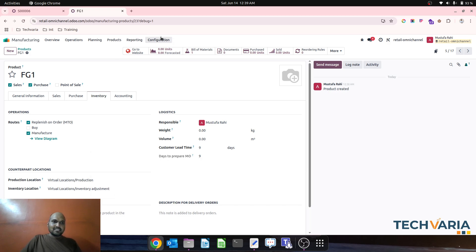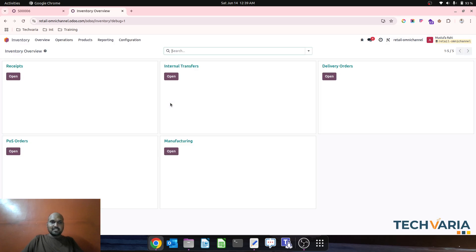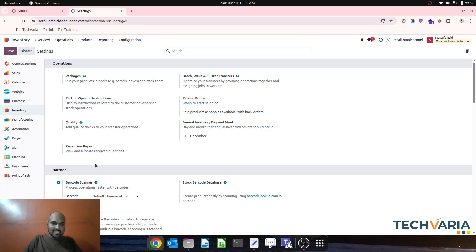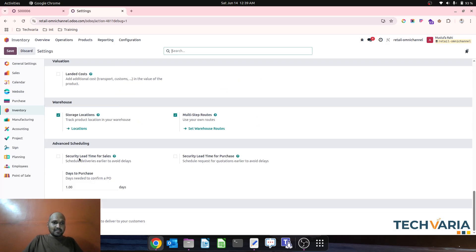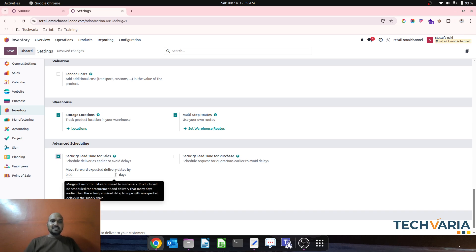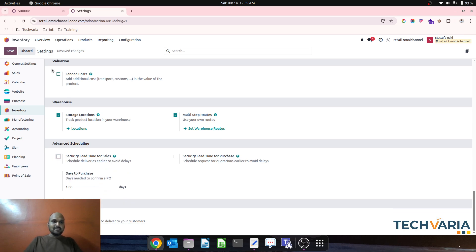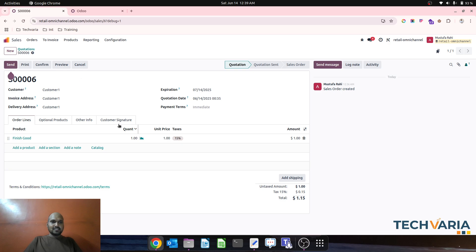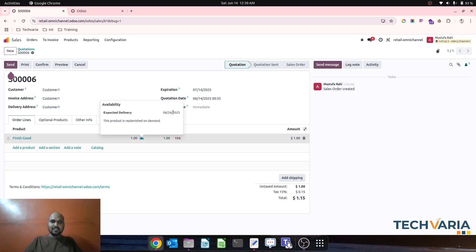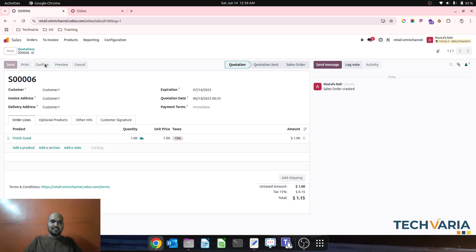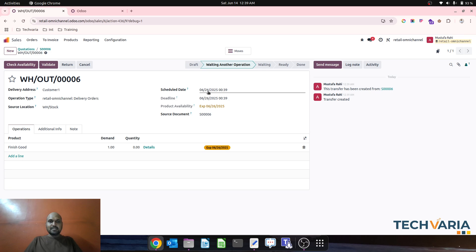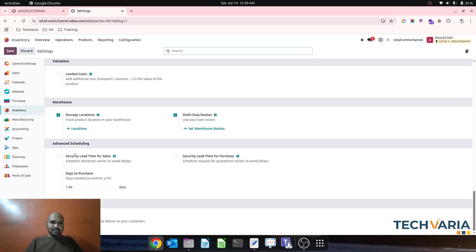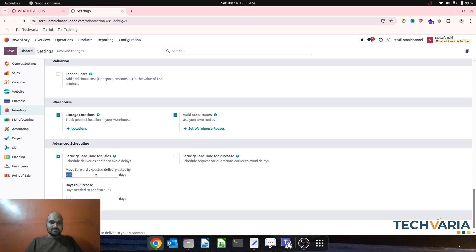Let's understand different lead times based on inventory. Going into inventory settings — security lead time for sales. If I disable this and create a sales order for finished goods, the expected delivery date is 12 days from now based on my entire cycle. When I confirm, the scheduled date is the 26th.